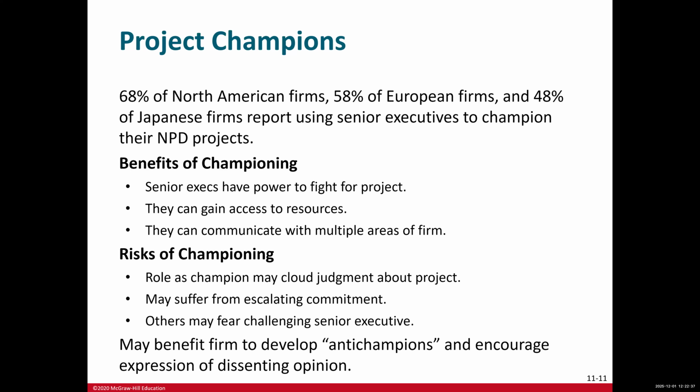Another risk is that senior executives in their role as champions may suffer from escalating commitment, right? What do I mean by that? They have a tendency to continue investing in a failing project, as I mentioned and explained why, because they've already invested time, money, resources, and most importantly, their reputation, right? So they want to make sure that this project is going to be successful no matter what. But sometimes that doesn't work.